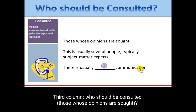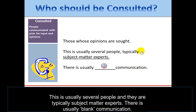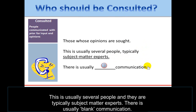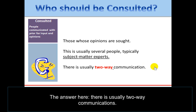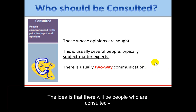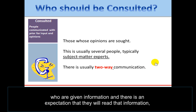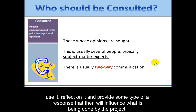The third column: who should be Consulted? These are people whose opinions are sought. This is usually several people and they are typically subject matter experts. There is usually two-way communication. The idea is that these people are given information, and there is an expectation that they will read it, use it, reflect on it, and provide a response that will then influence what is being done by the project.